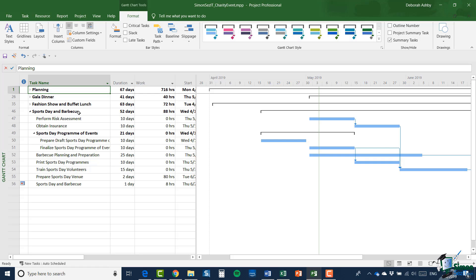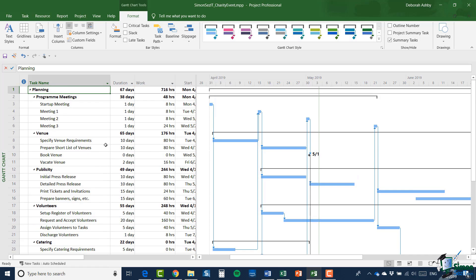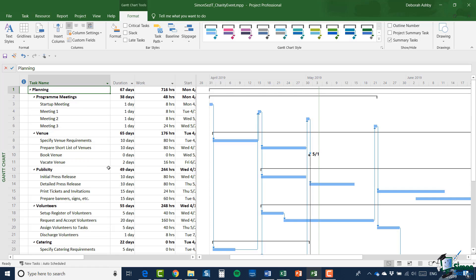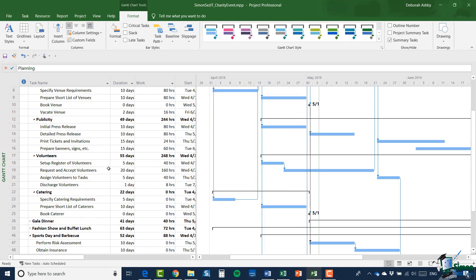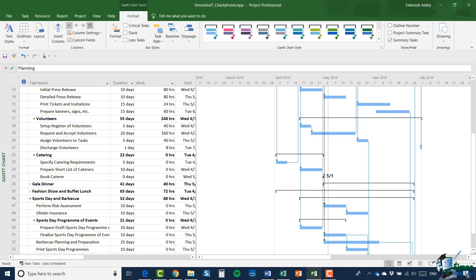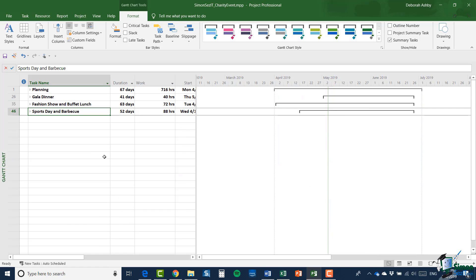At the moment, with my four summary tasks, I've only got the fourth one open, sports day and barbecue. And although you can see the links within that task because the other three summary tasks are currently collapsed, you can't see links to tasks within those from sports day and barbecue. But if, for instance, I were to expand the planning summary tasks, look carefully at sports day and barbecue tasks now. Now you can see that there are, in fact, several links to the planning summary task. When one of the summary tasks collapsed, you don't see those links. They're still there, but you can't see them.